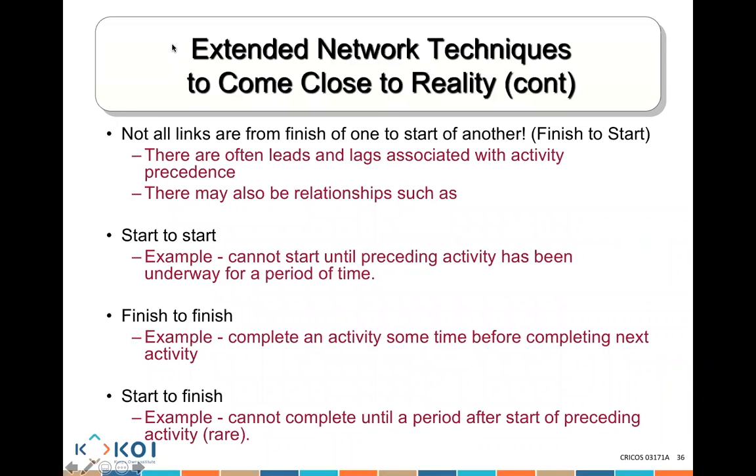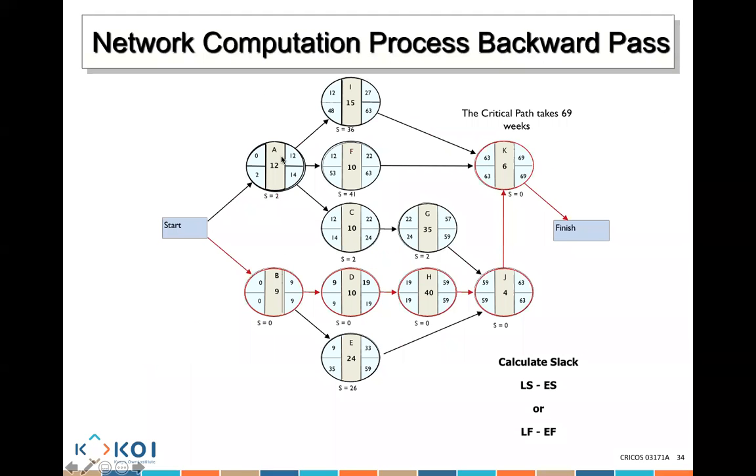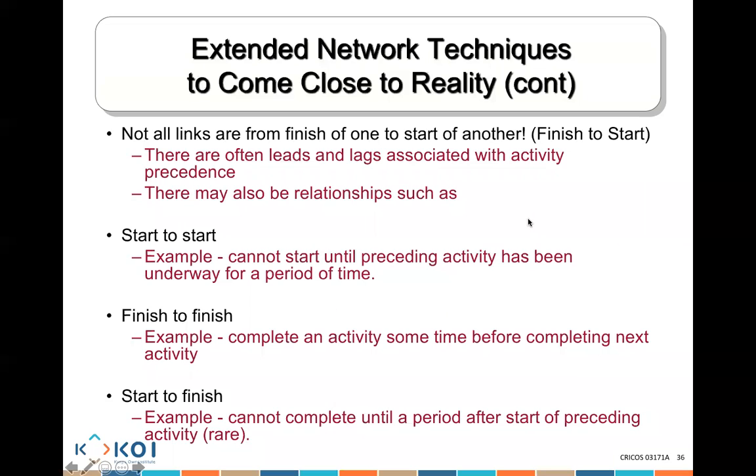You need to know that not every activity is going to have a finish-to-start relationship. If you look here, this will finish, then this will start. This will finish, then this will start. Not every activity is like that. Not all the links are finish-to-start. There are often lead times. There are often lag times. For example, sometimes you can only start the activity 5 days after the earlier activity. You can't do them immediately one after the other. There may be all of these relationships that you need to think about and bear in mind.